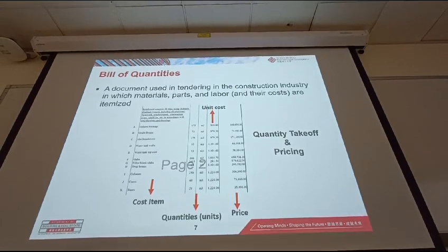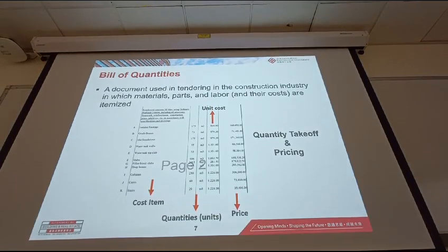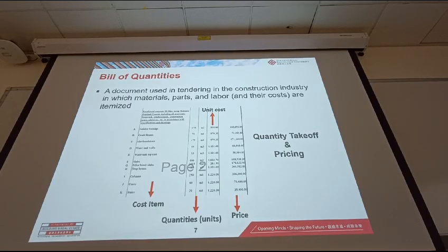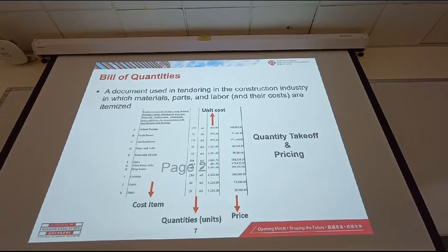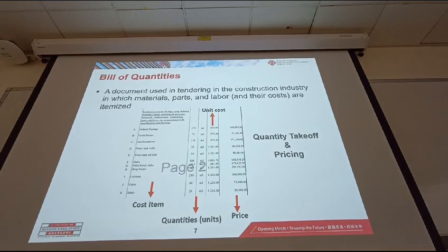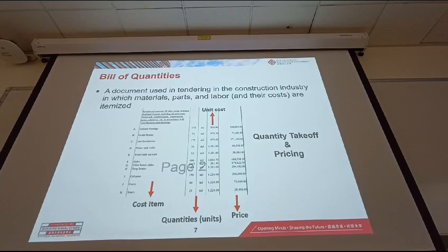Quantities come from the BIM model, but we don't have a unit cost, the unit cost of some material or construction work. Quantity surveying firms have their own cost database, or they may need to investigate the market price. Then they need to add this information to prepare the bills of quantities, so we may need to do something to link this cost data.